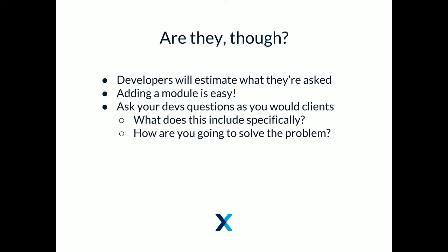So I think it's really important to engage your developers in this discovery and definition process and ask them questions, challenge them, say, you said 4 hours. If I ever get an estimate that's just a number, I'm like, wait a minute. Tell me what you are actually planning to do here? Because I need to know what it is before I can go and tell the client that this is a reasonable estimate. And obviously it's important to note that some developers are better at estimating than others. Some are probably better at understanding their limitations and what could go wrong and the kind of common problems.